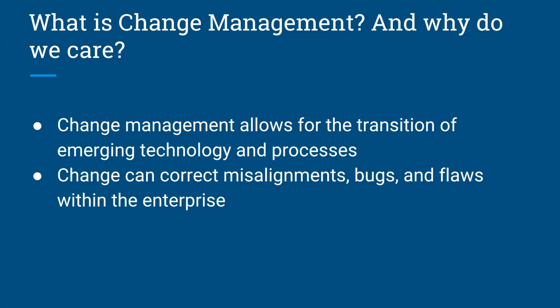Instead of booting out one technology and iterating the other technology immediately overnight, there may be certain problems that arise with this. So if you run them in parallel, you have the mitigation and the risk a lot lower since you'll have two technologies running side by side. However, with this implementation, there are a lot more costs and resources that are required to be able to run two technologies side by side.